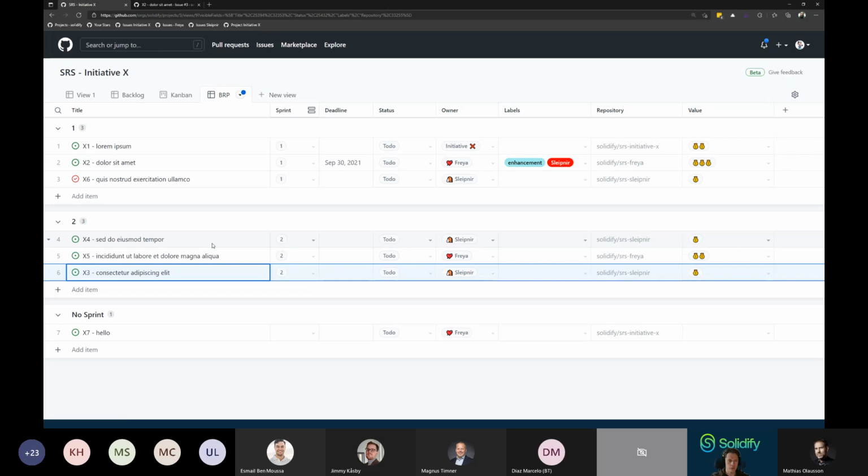You map it out visually so you can see what's going on, when you plan to deliver what, and by whom, etc. And then if you notice that there are dependencies here that make this not work out, we need to change the plan. You talk to each other and you change the plan, which we just did.